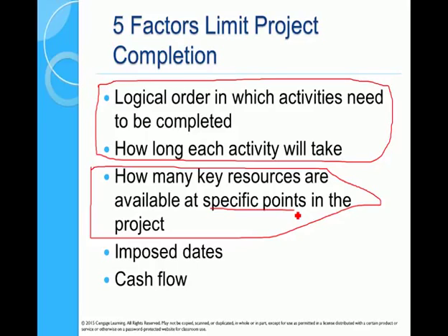Okay, so that's your model. We talked about that before. That was what we call the initial pass, or a model. Then we bring in some reality. There might be some imposed dates. We might not have a particular piece of equipment until September the 1st, or whatever it happens to be. In which case, we've got to work around that real constraint. We've got to find a schedule that meets that constraint. That may have an effect on the overall completion time.